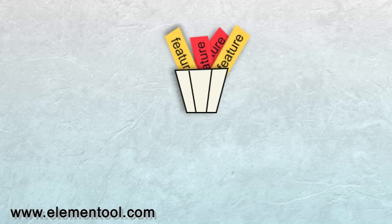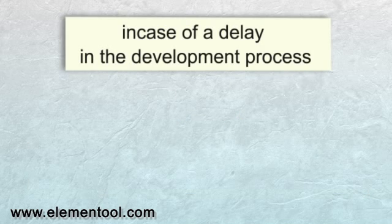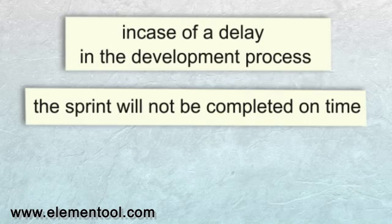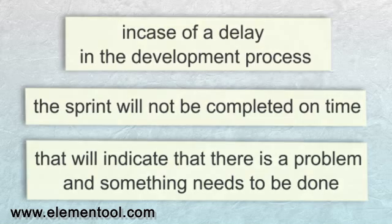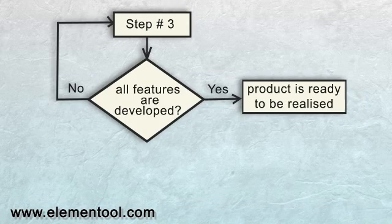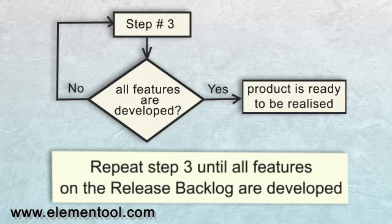It prevents the risk of developing features that the client didn't ask for. Also, in case of a delay in the development process, the sprint will not be completed on time and that will indicate to everyone that there is a problem and something needs to be done. Repeat step three until all features on the release backlog are developed and the product is ready to be released.